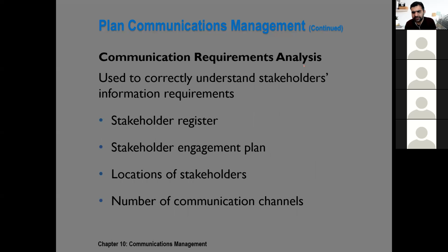Communication requirements analysis is nothing but when you are planning for the communications, you firstly get the requirements from your stakeholders related to communications. What are their needs? You can do it by reviewing the stakeholder register, stakeholder engagement plan, location of the stakeholders, and the number of communication channels.